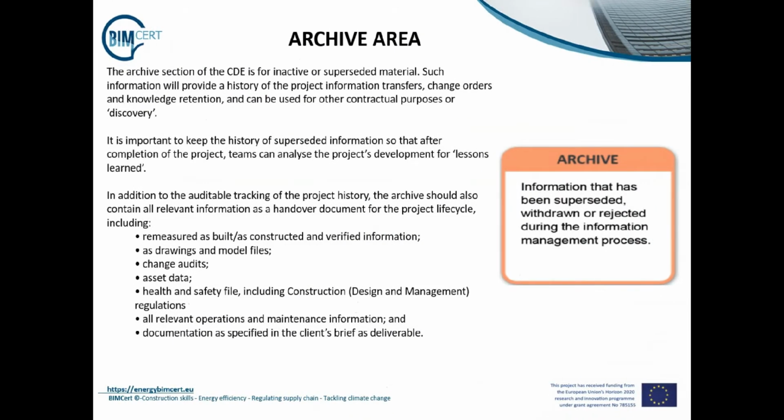Final folder is the archive folder. The archive section of the CDE is for inactive or superseded material. Such information will provide a history of the project information transfers, change orders, and knowledge retention, and can be used for other contractual purposes or discovery. It is important to keep the history of superseded information so after completion of the project, teams can analyse the project development for lessons learned.